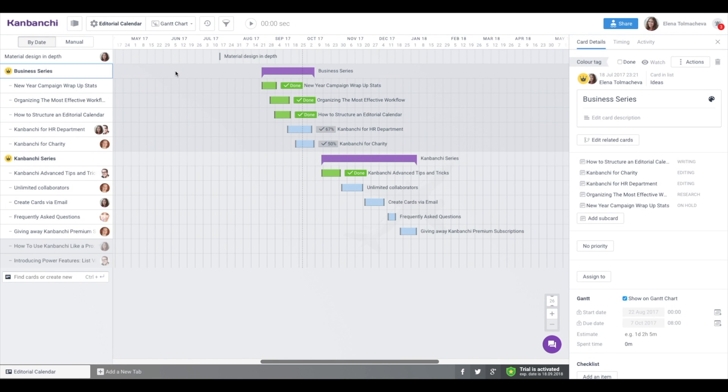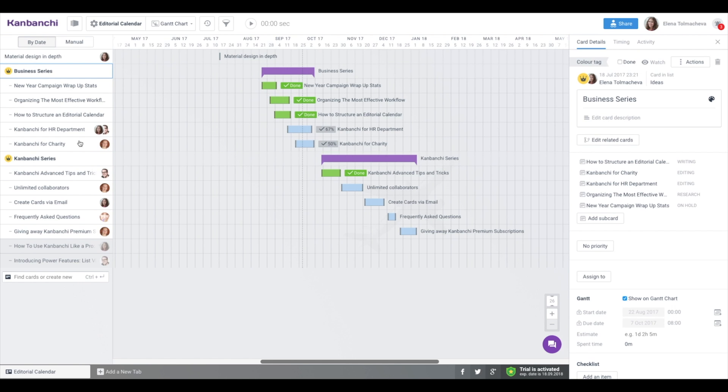The most beautiful thing is that the relations between epics and subcards are visible on Gantt chart. The epic bar is formatted differently and visually summarizes the group of its subcards. Subcards are indented.